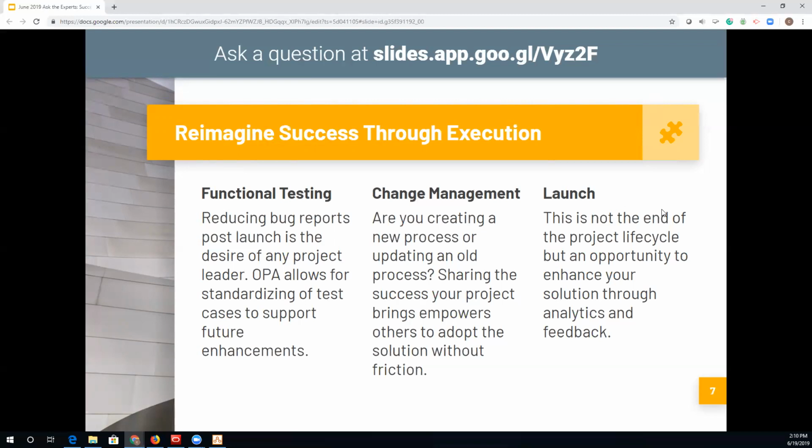And then overall, launch is not the end of the project. A lot of times for a PMO, that is the end of our project, but there is going to be a handover to a party or parties that are going to manage the delivered project for the life cycle of it being live for your organization. And with that, functional design documents are a critical path to making sure that delivery and management is successful into the future.